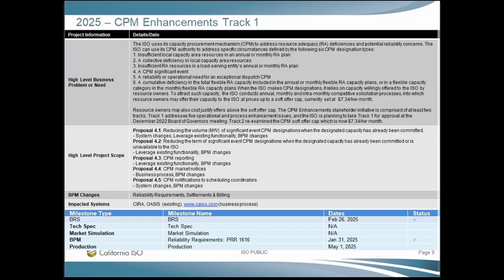wanted to push out the activation just to give us time to go through and make sure that we had our buffer to do the rest of our readiness items, including letting customers know and getting the changes planned and implemented in production before the cutover. So it's just, I think, the cascading effect of longer than expected testing on our side.